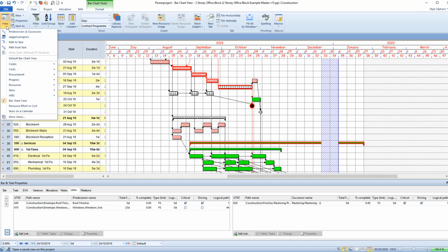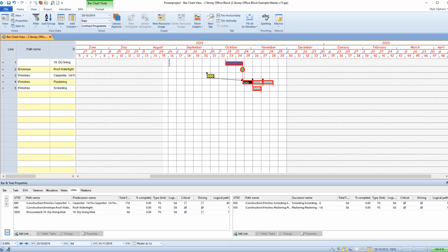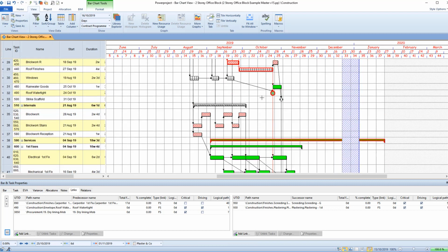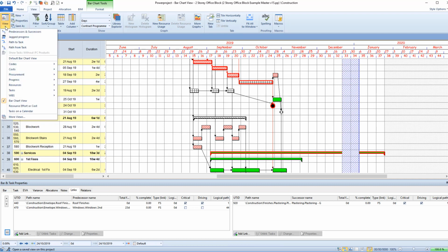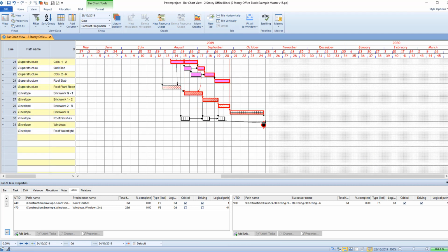And so the other ones, to remind you, are the predecessor and successor view. We can navigate all of the immediate incoming and outgoing activities, and we can double click to chase those. That's a mode that you get out of. We're looking back to how did we get here, how did all the things that link into this? That's the path to view, with all the links or just the driving links. So that's how we got to this point.